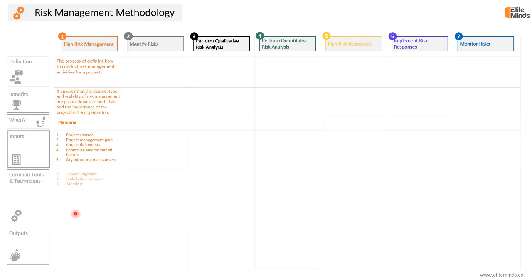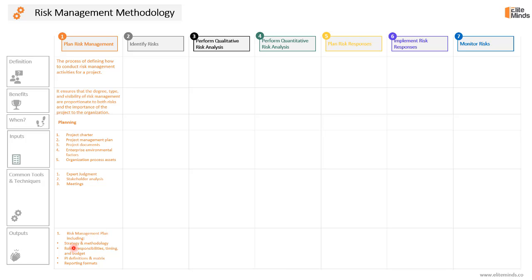Once you have these inputs, the tools and techniques we can use for this process are expert judgment — you need to consult with experts within or outside the organization. We will conduct stakeholder analysis as a data analysis technique to determine the risk appetite and risk thresholds of the stakeholders. We will also conduct meetings in order to plan for risk management throughout the project. One key output will be the result of the planned risk management process — the risk management plan.